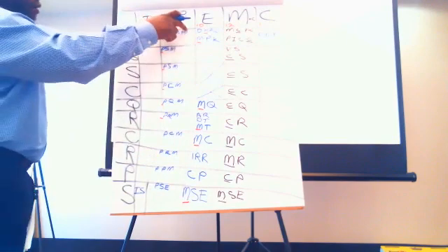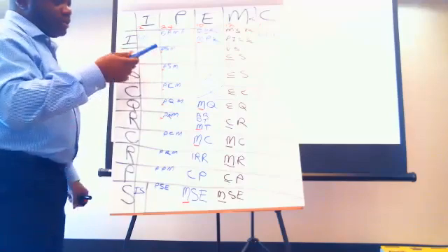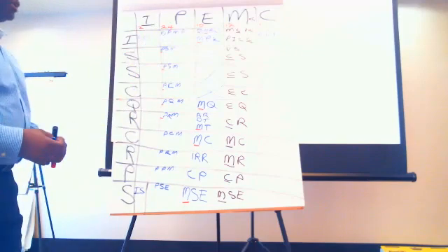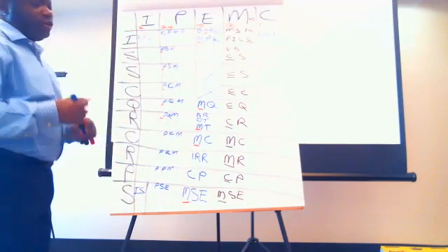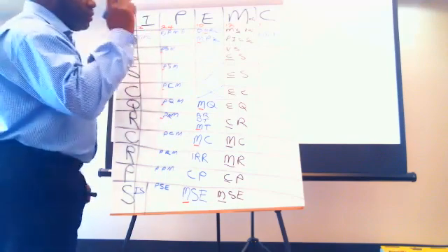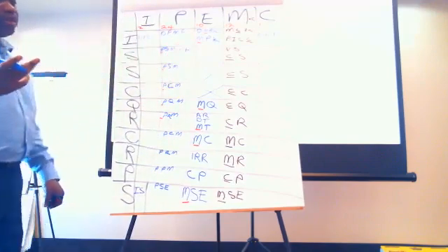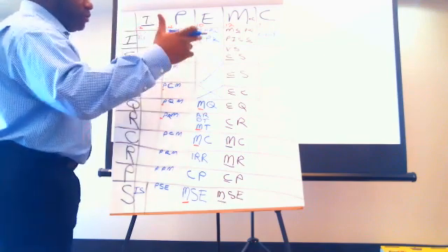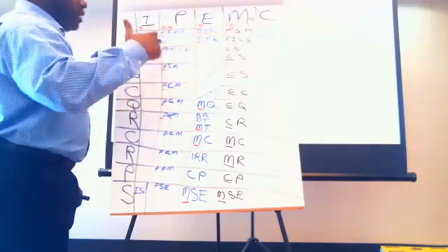So what we have to contend with is this stuff. Well, we already have develop project management plan up here. So all we need to do is go back in time and ask ourselves, what is the sequence for carrying out the tasks or the work in each of these knowledge areas? Of course, you're always going to plan first, plan something management. But then in scope, what do you do first? You collect your requirements. You don't go into define scope until you have done collect requirements. Just remember, requirements begets scope. So R before the S, like in the alphabet, QRS, R before the S.